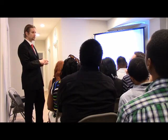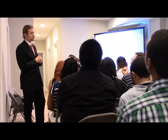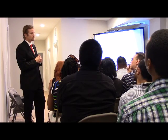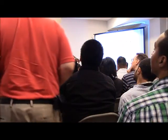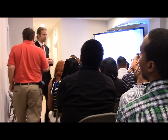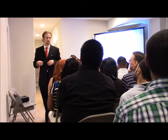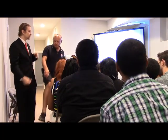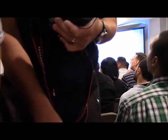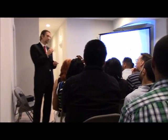Excuse me, one more question, sorry. I don't know if this applies to you, but if you're doing a construction loan, are your disbursements tied to the inspections? You mean, like, let's say the plumber gets his final payment? Well, yeah, you get your payment to pay your subs. Yes, we have many draws. We have a payment schedule with all of our trades listed on it, and their exact amounts that they're getting paid.